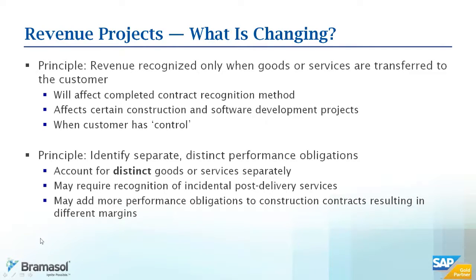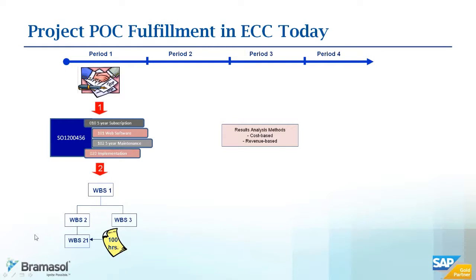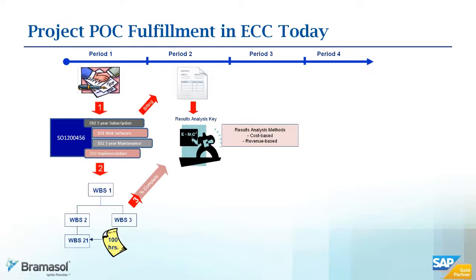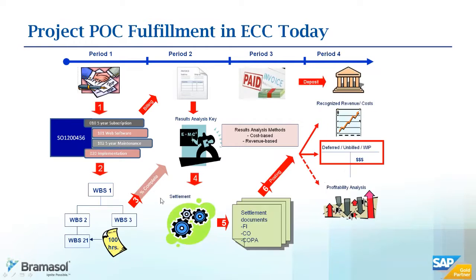Let's talk about what we see out there in terms of how it operates today. The percentage of completion and fulfillment in ECC operates something like this: you have your project with your WBS structures, and you run results analysis and do the further steps in there. In the second period, you have your results analysis key set up and look at the percentage of completion. From there, we look at invoicing and billing, handling the settlement process, and it goes to deferred or unbilled depending on how we've set up our accounts.